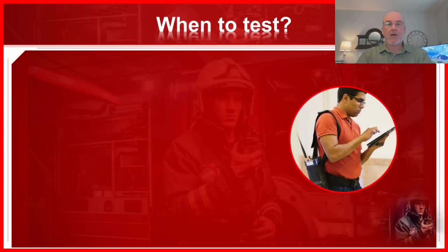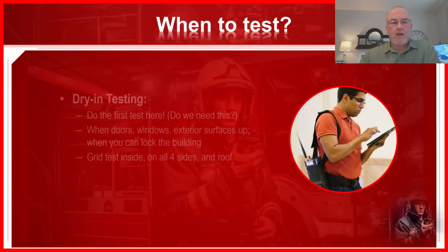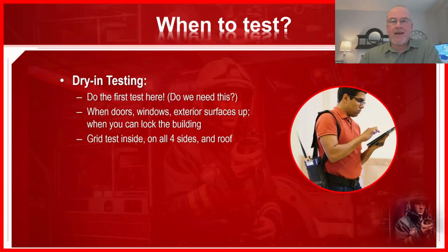When are we going to test? Obviously, we can't wait till the day before the CO to test. Okay, that's when you probably have your best number ever, when everything is all done. So we can't wait that long. So the recommended time to test is in dry in.